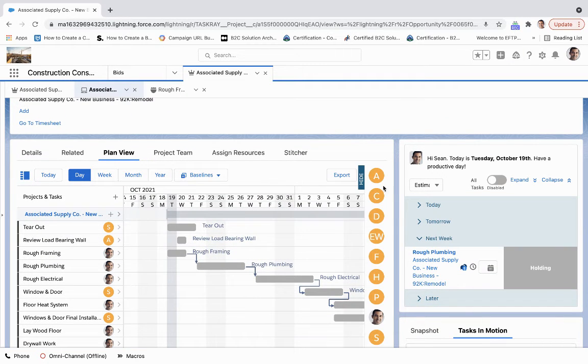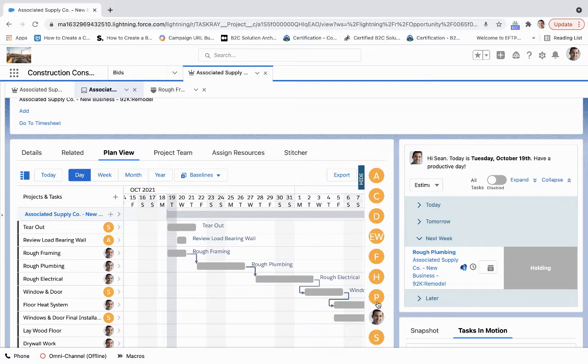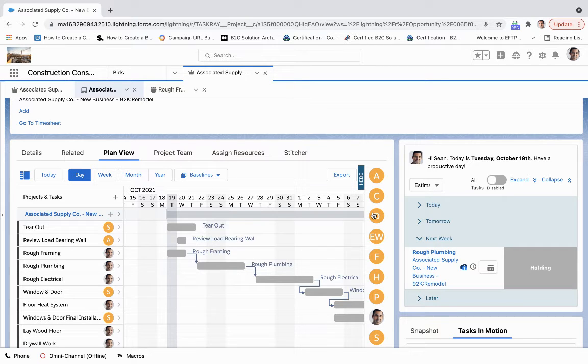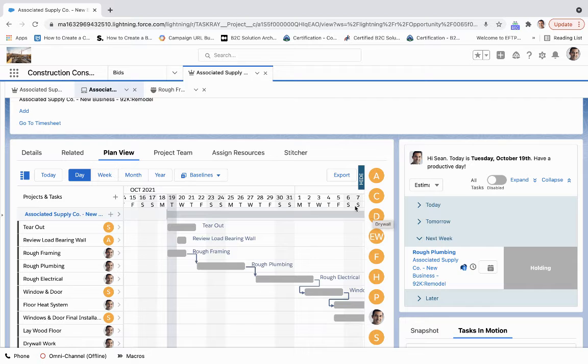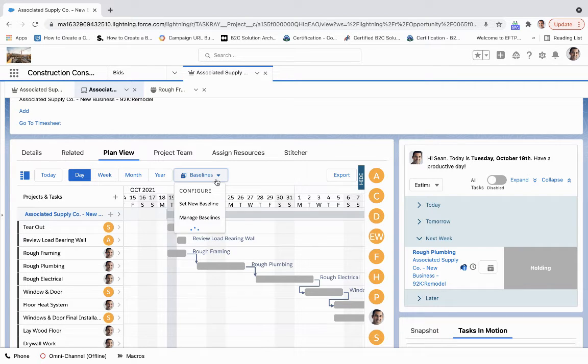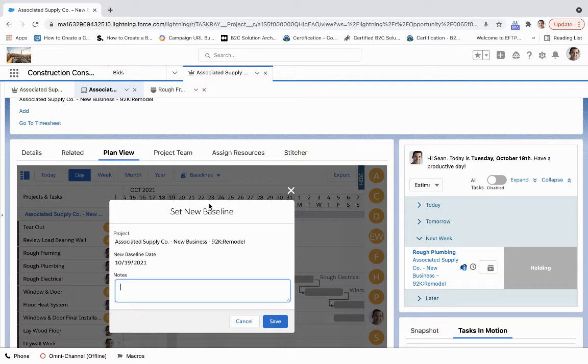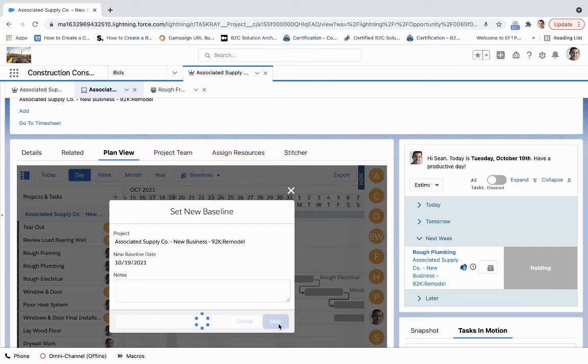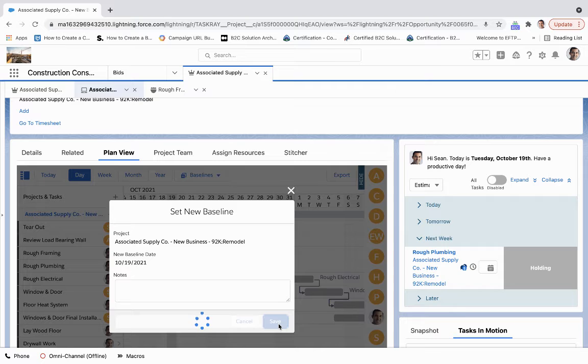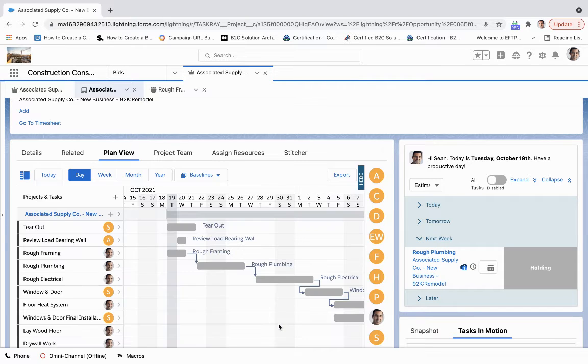So if we come over here to the team, we can understand all of the members that are on this team. And we can assign this to either a queue or we can assign it to a particular user. And we can set a new baseline here. So we are going to put this as the baseline date. So this will track any changes that we make here.